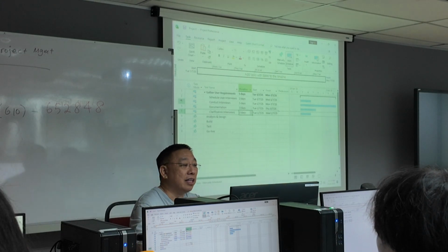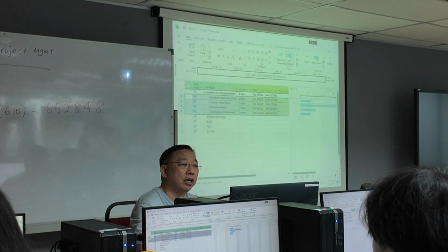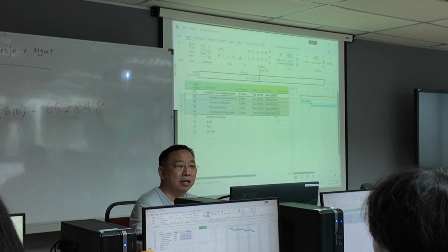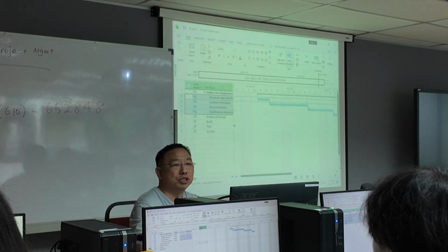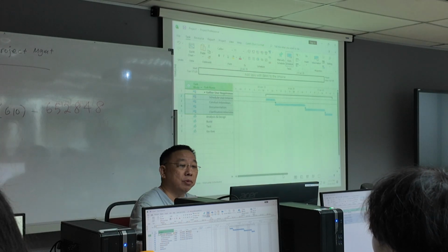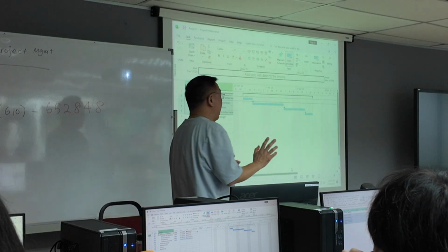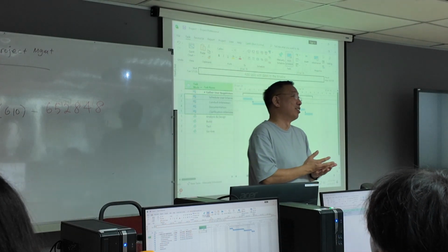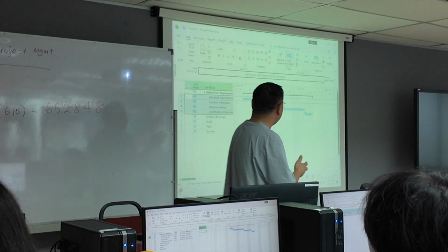Okay, so then what you do is you select all 4 of the subtasks, and now we do the linking of the selected tasks to go one after another. And now you can see very clearly, you make your left window smaller, and let's zoom out a bit. You can see all the subtasks scheduled. We haven't done one thing yet. We haven't put resources, which is the business analyst. Okay, so later on we'll do that, but I think for first class, I think this should be enough.